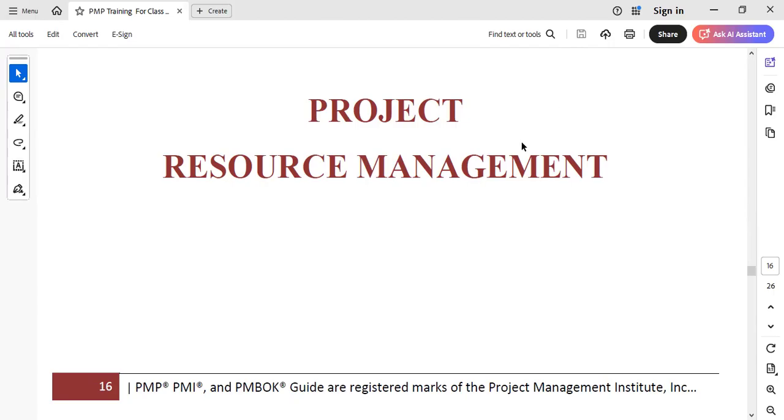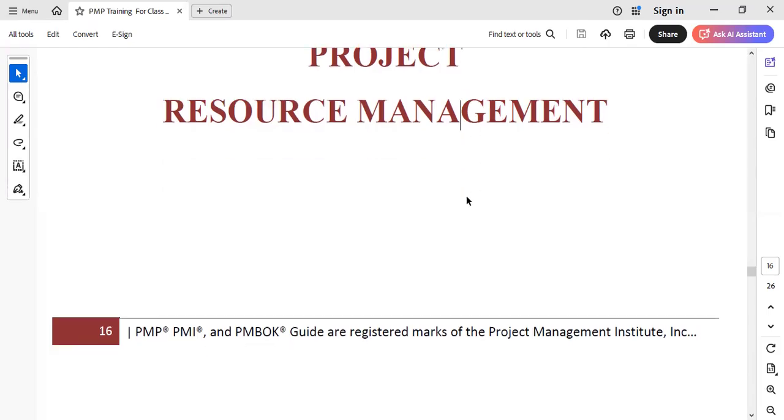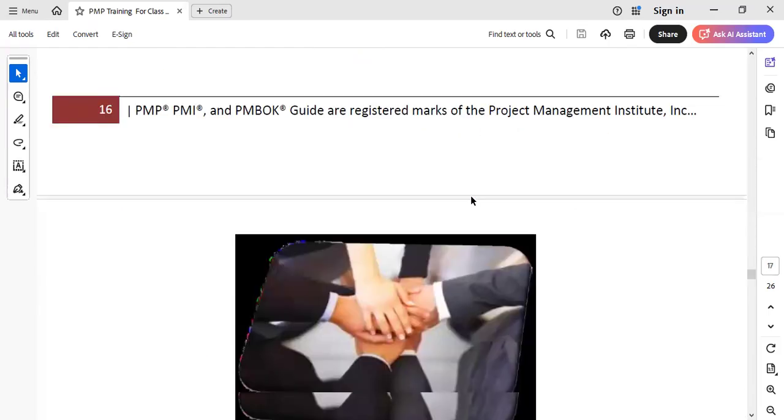We talked about cascading the work breakdown structure to the work package level and further subdividing the work packages down to the activity where estimation would be made. When you pick an activity, it will be easier for you to make an estimate of the resources required to complete that activity.